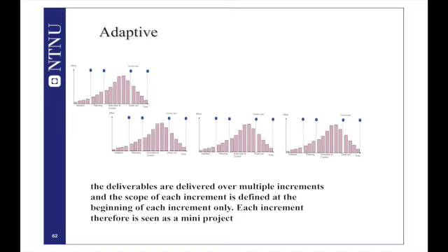In order to respond to the challenges of the plan-driven approach, there is the adaptive or incremental approach. Rather than delivering all the scope at once, you divide the scope into small pieces, and you don't have to know all the pieces in advance. It is enough to identify a piece of the puzzle. You solve this puzzle, and then you work and develop in short intervals.